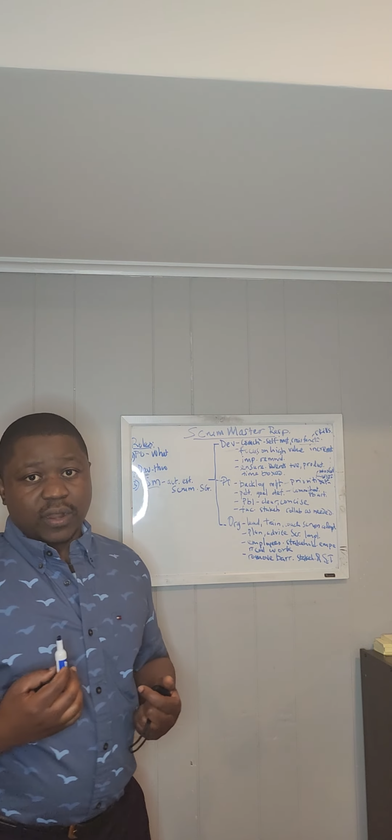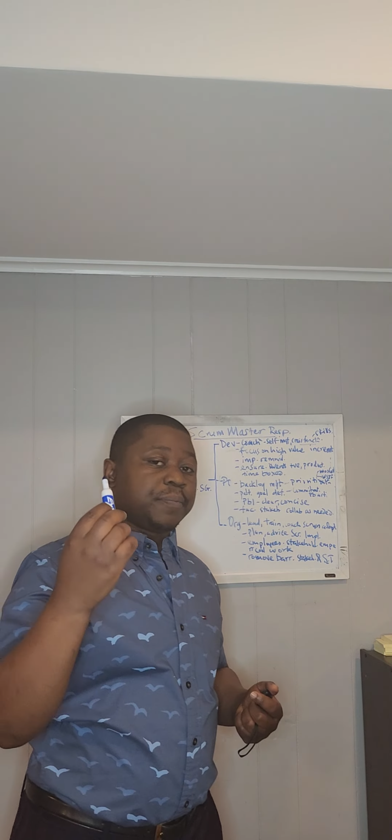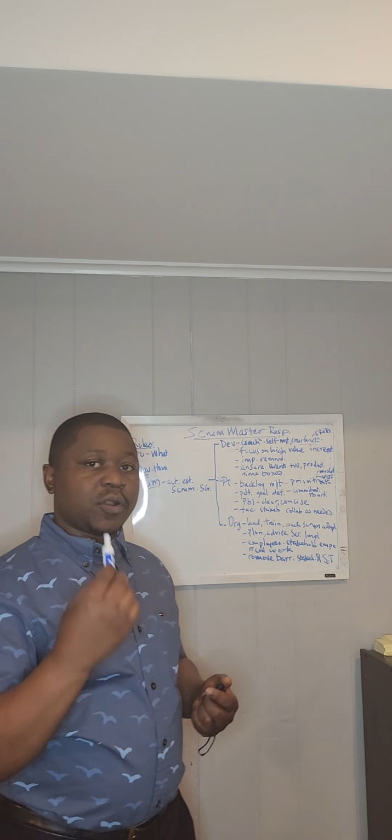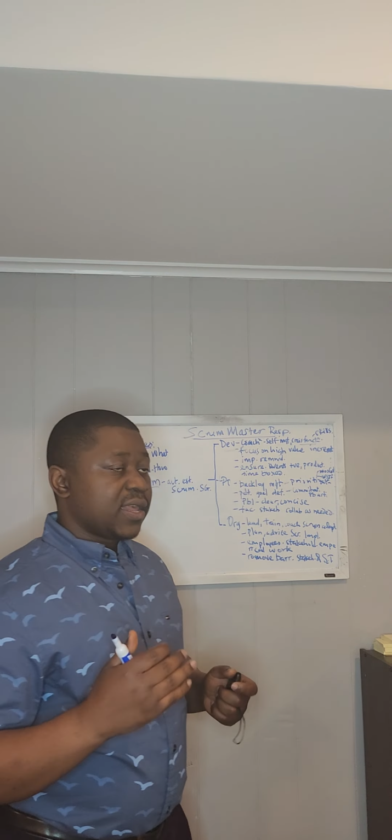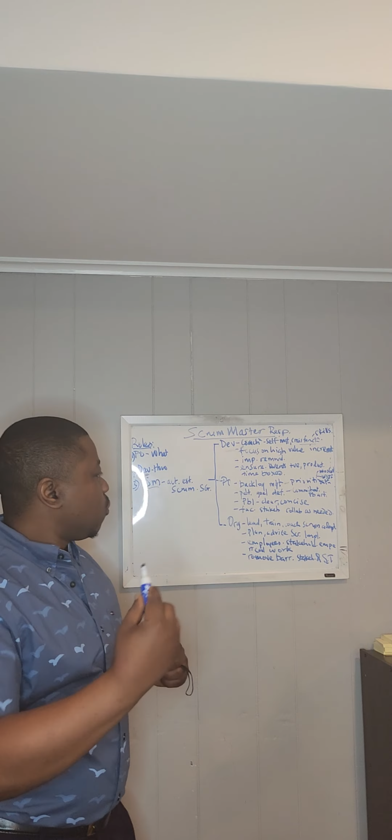Another way he helps the product owner is to come up with a good definition of the product goal, right? And the product goal is a commitment to one of the artifacts of Scrum, which is the product backlog. So he helps the product owner come up with a good definition of what the product goal is. What are they trying to build, right? So he helps that product owner come up with a very good product goal so that it serves as a good pointer and the kind of North Star on what they're actually working towards, right?